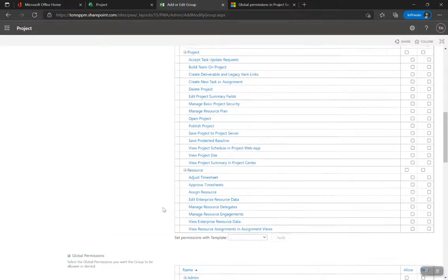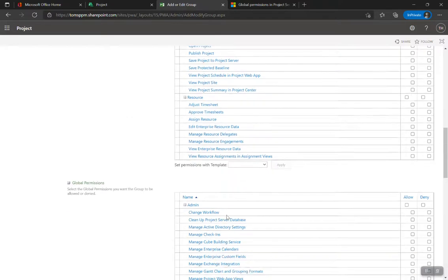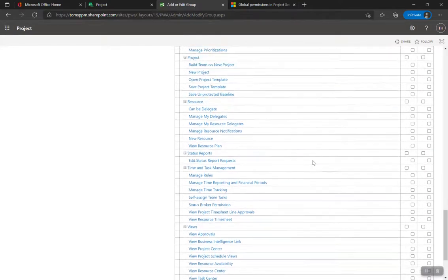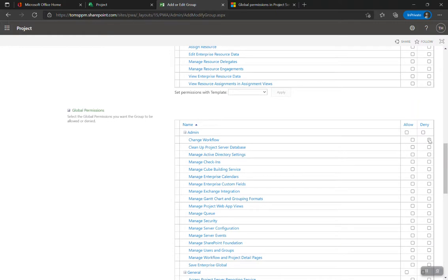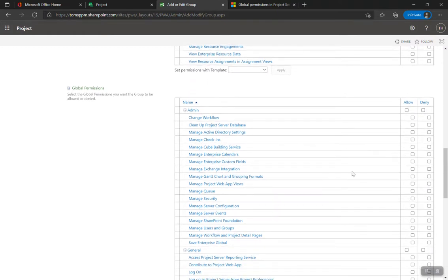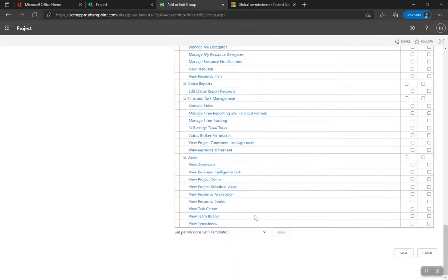Under category permissions, we'll come back to add custom categories later. For global permissions: Allow lets them do it; Deny means they definitely cannot do it regardless of other permissions — it's a hard deny. If you leave it neither allow nor deny, they won't be able to do it but aren't explicitly blocked from being authorized elsewhere. If someone is in multiple groups and is denied here, that deny takes precedent.